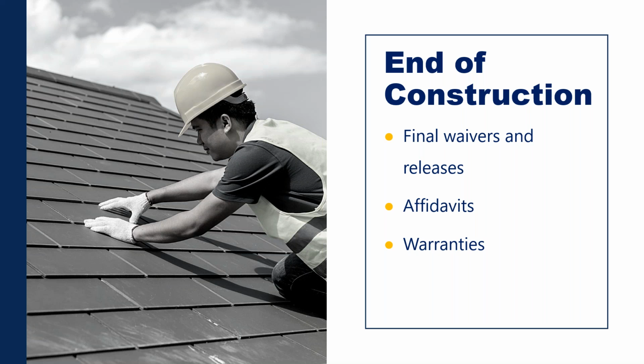Warranties, okay, we run into warranty issues all of the time. All the time we run into them because the salespeople either oversell the product's capability, they offer warranties that they don't have, they can't get the year requirement. They say something is an NDL when really it's not. They use dissimilar materials, okay? They may use product A for a bottom layer underlayment and then a different manufacturer for a top layer, and there may not be the required approvals or whatever is needed to honor the warranties. So navigating warranty claims is always an issue.